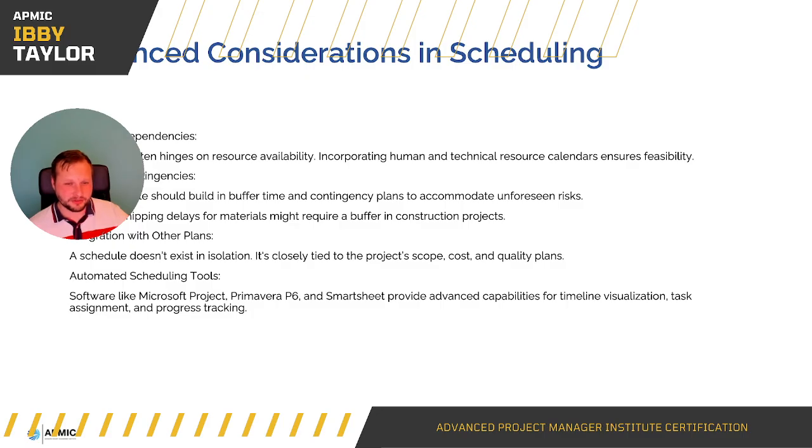Shipping delays for materials might require a buffer in construction projects. Exactly right. And that is something that is typically outside the control of a project manager. But a good project manager is aware of those risks, has done their risk planning, and knows that they might need a buffer in place to deal with these uncertainties.